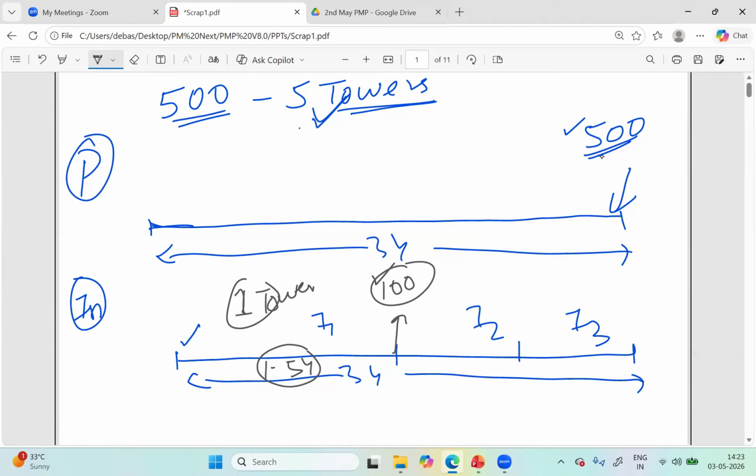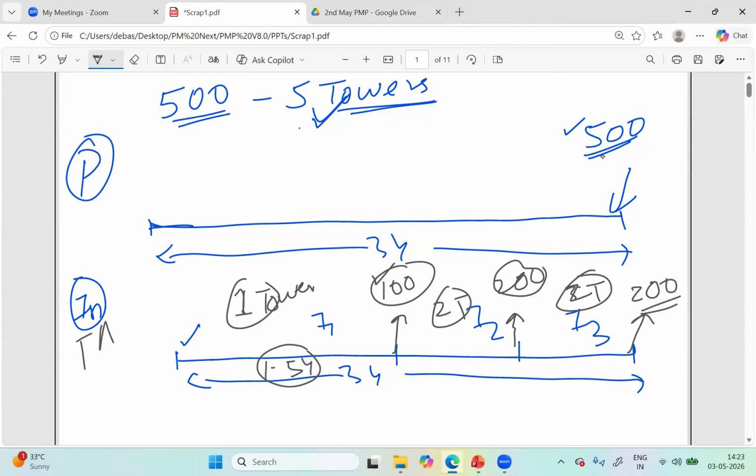Then in iteration 2, we pick up 2 more towers and work. And by the end of iteration 2, look, another 200 apartments delivered. And in the last iteration, the 3rd one, there are 2 more towers that were remaining, we work on, and we will release or deliver those 200 here. So you saw the difference? This is incremental. So here, what was the goal? We wanted to deliver fast. We didn't make our customers wait all the way towards the end of the project. Okay, so that would be incremental. That's what I meant as fast.